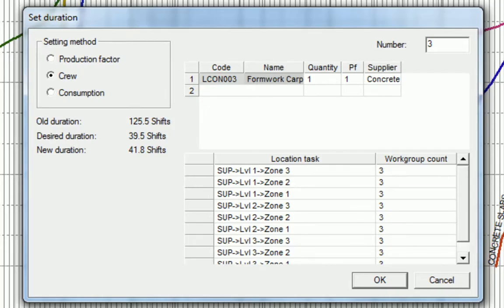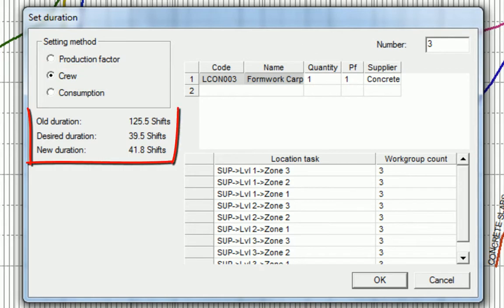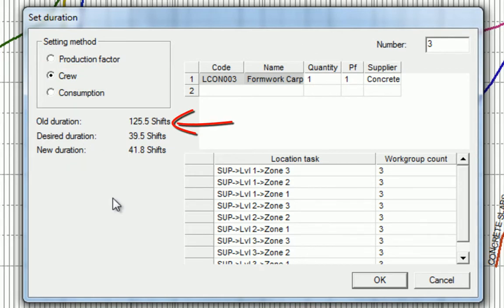This dialog prompts us to make a decision. The default setting is to change the number of crews. Vico Schedule Planner calculates the number of crews required for your desired duration.